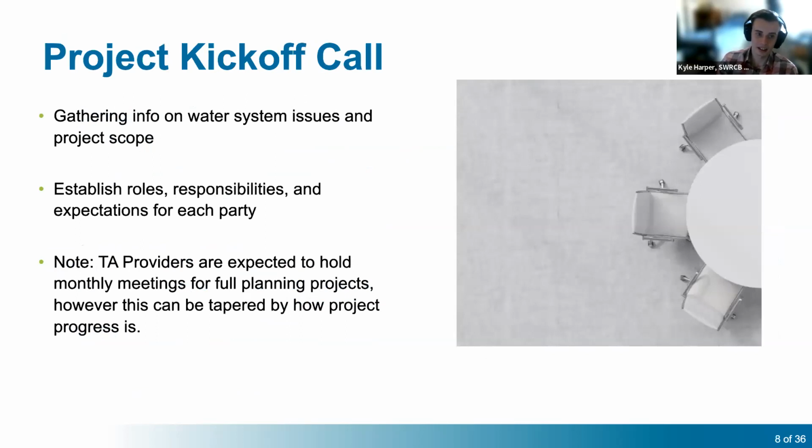Okay, and then after a TA is assigned, the next important step is a kickoff call. It is the expectation of DFA that every full planning project will have a kickoff call, because the purpose of a kickoff call is to get the TA provider, the system, and all the water board staff all on the same page, for gathering info on the water system and discussing the scope of the project.